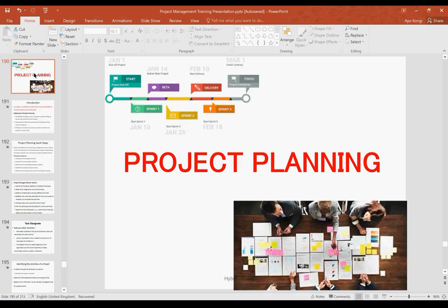For this racking and warehouse project, what we want to do is schedule management. Okay, an example. The schedule management strategy is a document. Within the document, we have how we intend to identify our activities. I just gave an example. We'll do a workshop; that's how to identify activities. We'll look at documents. In order to identify activities, we use our WBS, our work breakdown structure. We spoke about work breakdown structure 2 weeks ago. We use our work breakdown structure to identify activities.